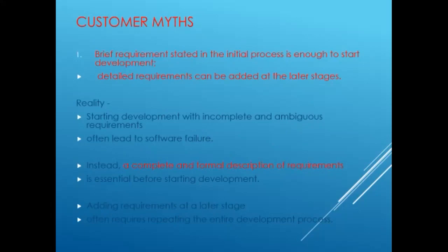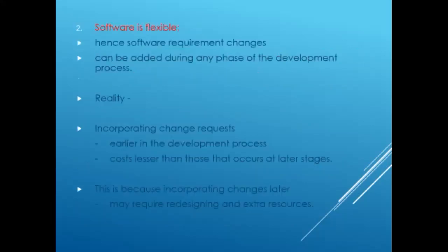Instead, a complete and formal description of requirements is essential before starting the development. Adding requirements at the later stages often requires repeating the entire development process. This is the customer myth.